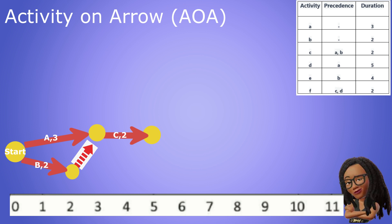Activity D only has A as a predecessor. So we draw an arrow from A's terminating node for a length of five days which means activity D terminates at day eight on the timeline.